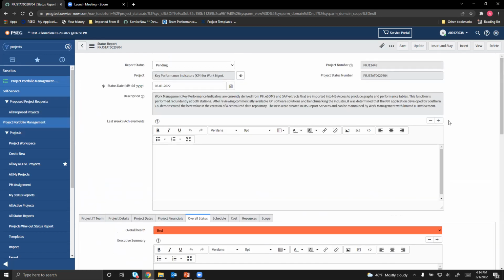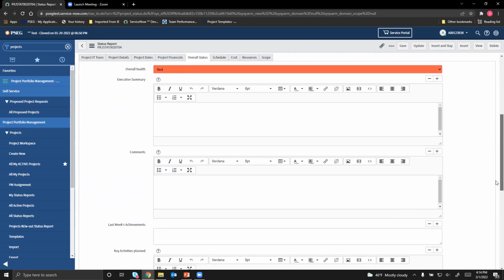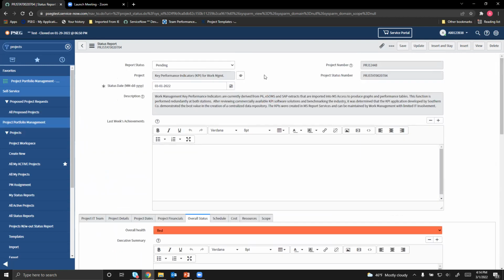And then this goes to GPM for approval. He has to take a look, and he's also agreeing to what information is here. And then once done, you can mark it as approved by GPM and save it. So this is what you have to do on a bi-weekly basis. Once you do that, we get the information, and we can go back to the deck to cover what I said and take a look. So I will stop sharing. Let me know if anybody has any questions.